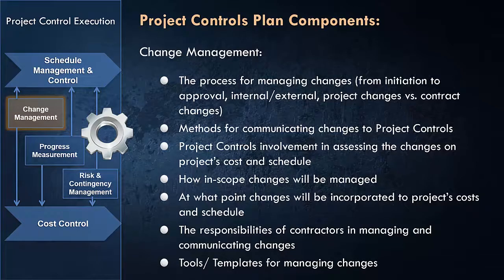Are you using a tool, a software for documenting the changes and kind of going through the process of the change management? Or are you using a template? If you're using templates, you can put your template, like your change order request and different things, as an attachment to your project control plan, so everybody is clear on the process or the template of the change management process.